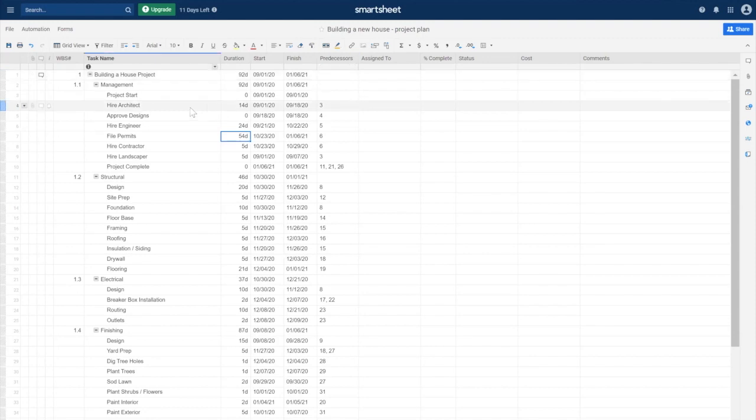Okay, so what are we going to enter next? We now have all of the tasks entered. We went ahead and numbered our work breakdown structure again, just to level 2. What I recommend you do here is make sure that anything that you enter here aligns with your work breakdown structure dictionary. I mentioned that earlier. If you number all of your work breakdown structures to the lowest level, I recommend going ahead and entering it in your project schedule the same way.